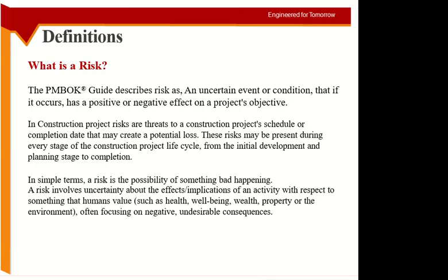Okay, and this is also because, as we have seen in CPM and PERT networks, that one activity can affect the other. So something happens on an activity on a critical path, the whole project, all the activities after that will be affected. So it becomes very complicated. This interdependency is very complicated. So the risk can be in any stage of the project. From planning to completion, any stage can be delayed.